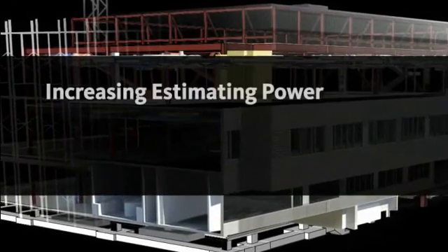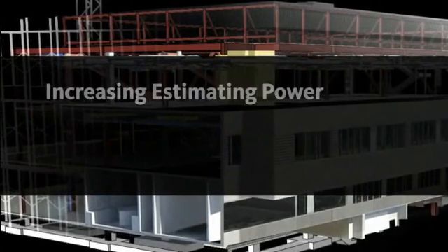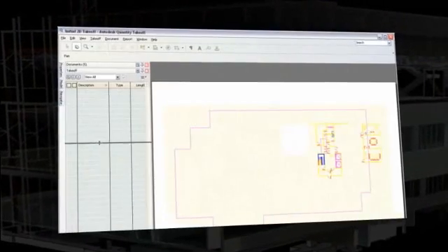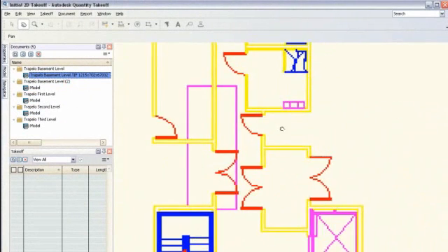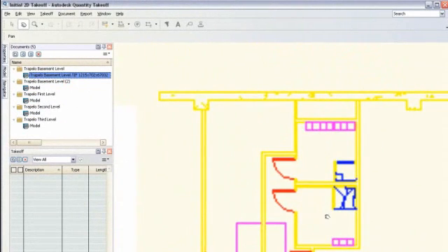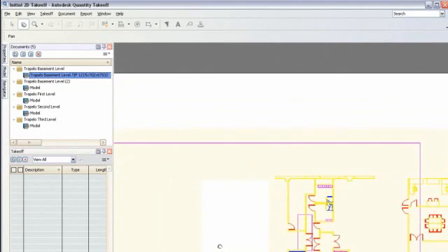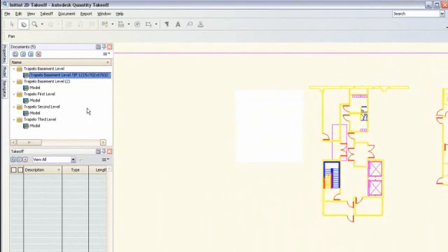Although a number of architects are starting to provide building information models, cost estimators are often required to perform takeoffs based on 2D design data or high-quality digital images from the design. For this reason, Autodesk Quantity Takeoff has a full set of intuitive manual takeoff tools, enabling you to perform on-screen takeoff of design data such as walls, doors, and windows.